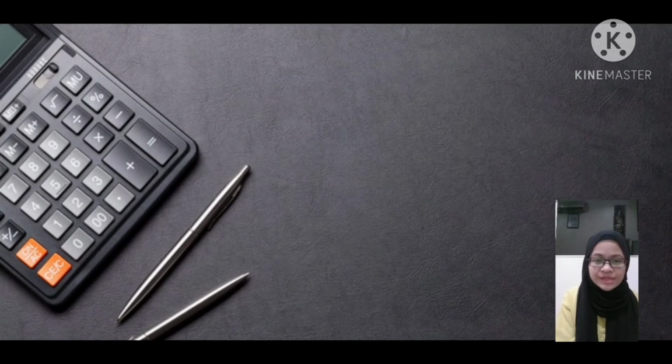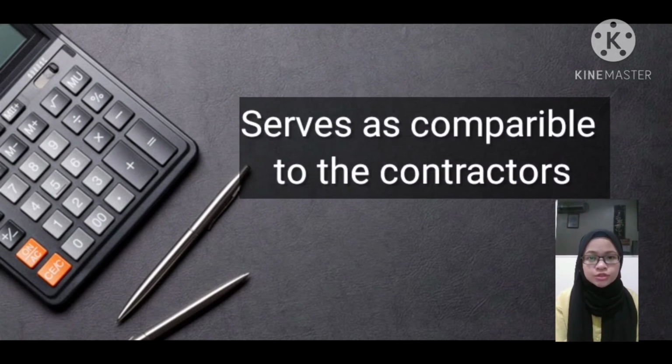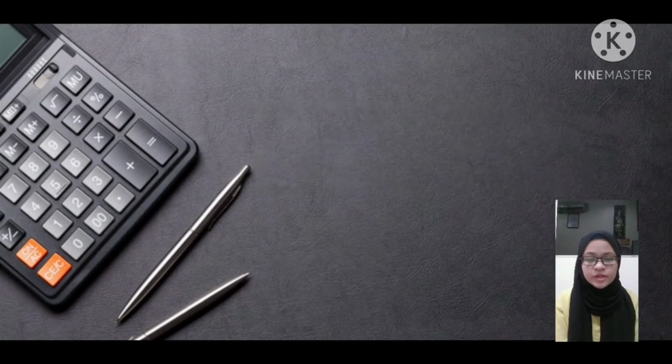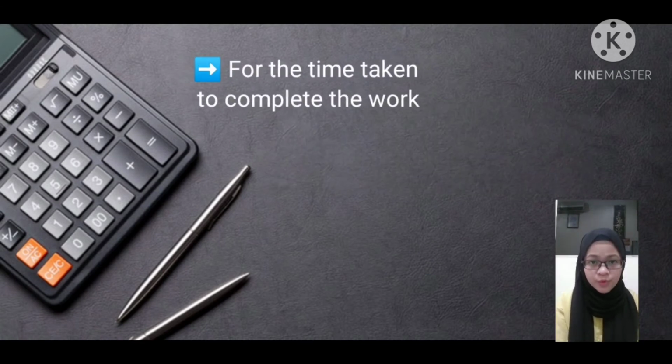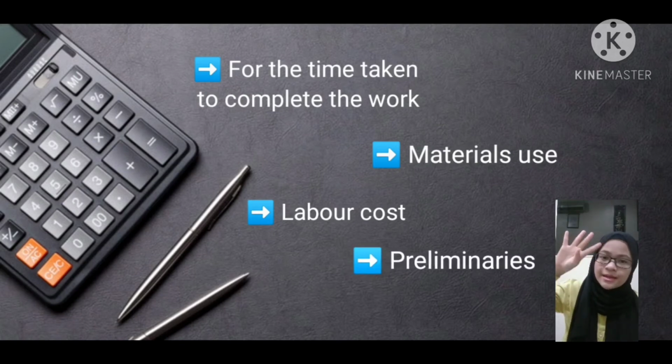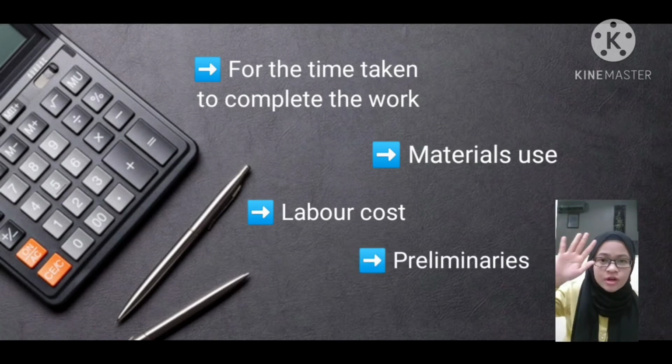In addition to this, these documents also serve as a basis of comparison between the contractors, such as for the time taken to complete the work, material use, labor costs, preliminaries, and finally the total cost.